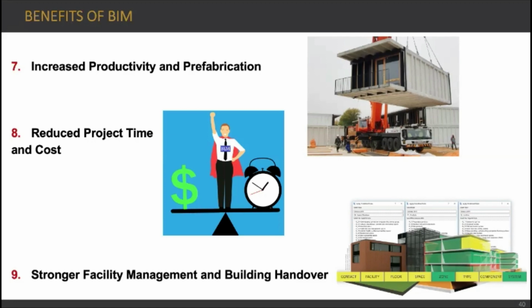Then, as we also mentioned a little bit, but I can repeat here again, it provides stronger facility management and building handover, because after you finish the construction of your project, for the operation and maintenance phase, you may still need information to manage your facilities. So if you provide the collected information from the design and construction phases for the building systems, for example, the purchase date of a system or other necessary information, even the zones, you can get the related data from your database, and you can use the information for management purposes, and it will provide seamless workflow processes for facility management.